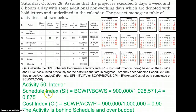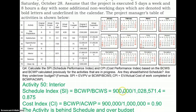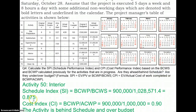For the other activity in progress — interior works — the schedule index is calculated by dividing £900,000 (the budgeted cost of work performed) by the budgeted cost of work scheduled. Both the schedule index and cost index values are less than one, at 0.875, indicating that this activity is behind schedule and over budget.